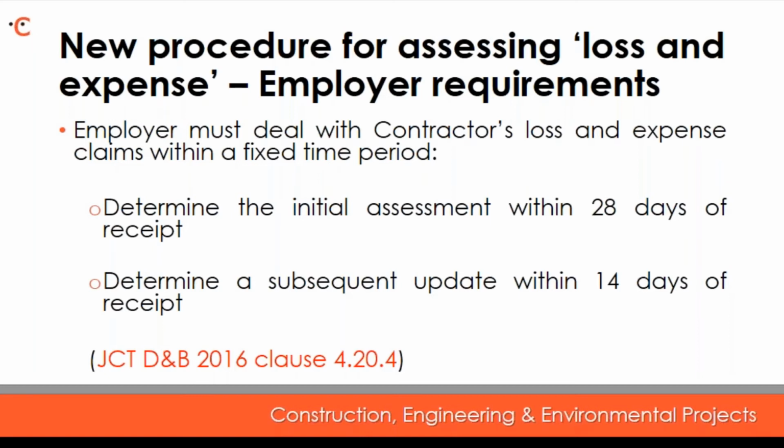The drafting in the 2016 edition could be interpreted as the employer having to make a determination at an early stage in all cases, and that determination being final, which is likely to be detrimental to both the employer and the contractor. So our recommendation is that employers seek advice on amending the 2016 edition to ensure that they have the express right to defer and also to challenge such loss and expense assessment.